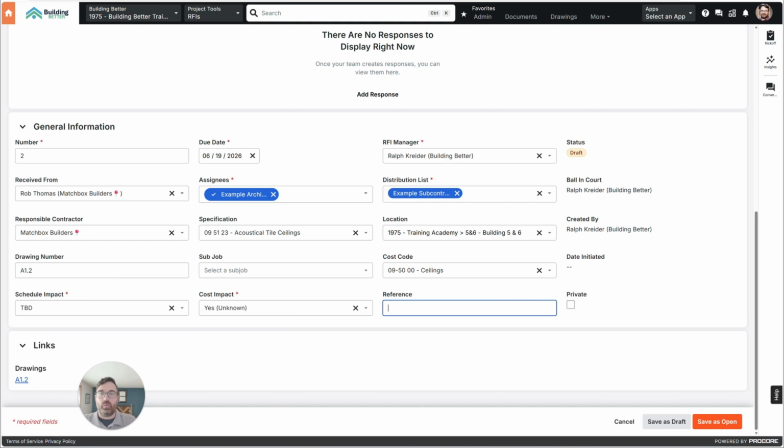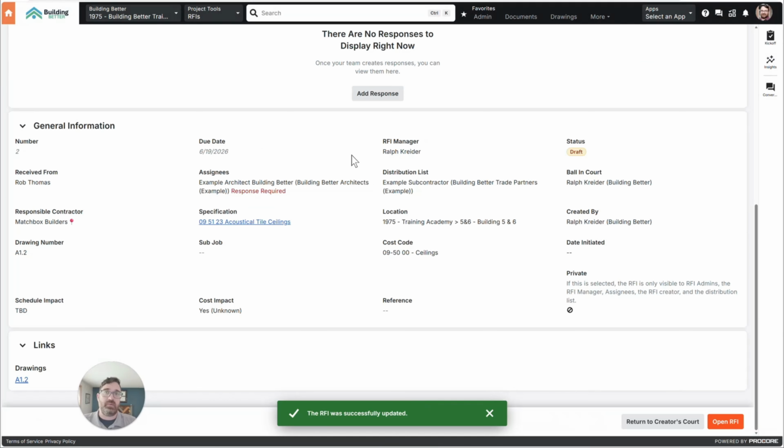Now, we get notified here of this response. So reference and private, you could put it as private. I don't really recommend it. If you're not ready to share it yet, go ahead and save this as a draft. I need to think about it. It needs to be reviewed. If you're going to do an internal review before it gets sent over to the design team, and maybe you have a project engineer or someone newer to the team, just save it there.